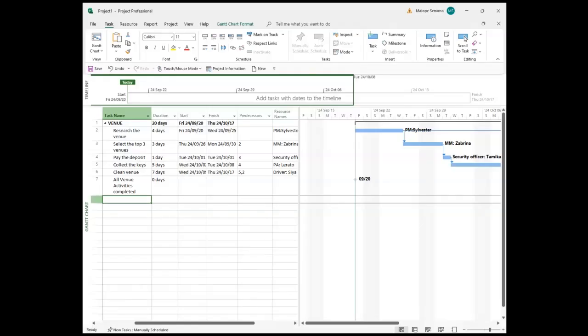Now, let's focus. Remember we said you need to number your deliverables, you need to number your activity list. You know that on your activity list, you must have deliverables. Maybe if there are 5 of them, you're going to have 1, 2, 3 deliverables. But under each and every deliverable, you need to number. For example, if you've got deliverable number 2, you're going to have activities as 2.1, 2.2, 2.3, 2.4.